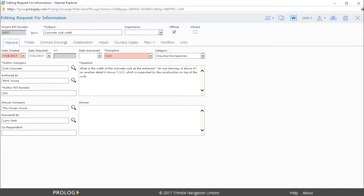The workflow function in Prologue can be used to route records between team members for approval. You can generate a workflow by template or by ad hoc. A workflow by template means the designated approvers and routing steps are predetermined.